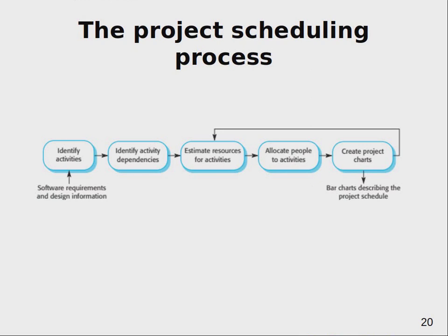And that's also one of the places where plans go wrong: you assume that you can assign a particular task to any person in your team. Unfortunately, it is not the case. It may be in such a way, but then of course you need to know and understand that some people may do these tasks quicker and in a more efficient way.